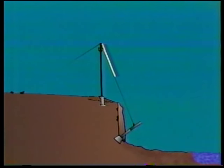First, as each rib is set, a forestay line would be connected to it and tensioned up until the crane could be cut loose. Next, the backstay line on that corner of the tower would be tightened to bring the tower back to plumb, to compensate for the added weight of the rib. And lastly, the forestay line would be readjusted if the rib was not hanging at precisely the right angle.